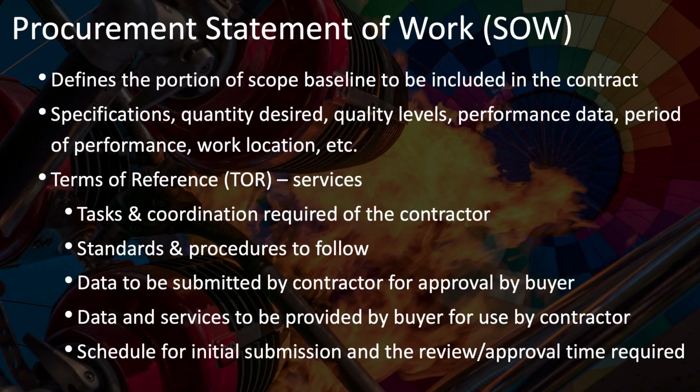Naturally, we argued that the system wasn't deployed because it hadn't been configured and loaded with data yet. They argued, on their part, that the contract didn't say that this particular milestone required any of that, and they felt that they should be paid. It seemed rather obvious to us that they hadn't met the requirement for that particular milestone, but the contract wasn't specific enough to clearly support either position. Fortunately, there were other milestones later in the contract that required them to finish the rest of the work. But this payment for deploying the system was a very unclear milestone.